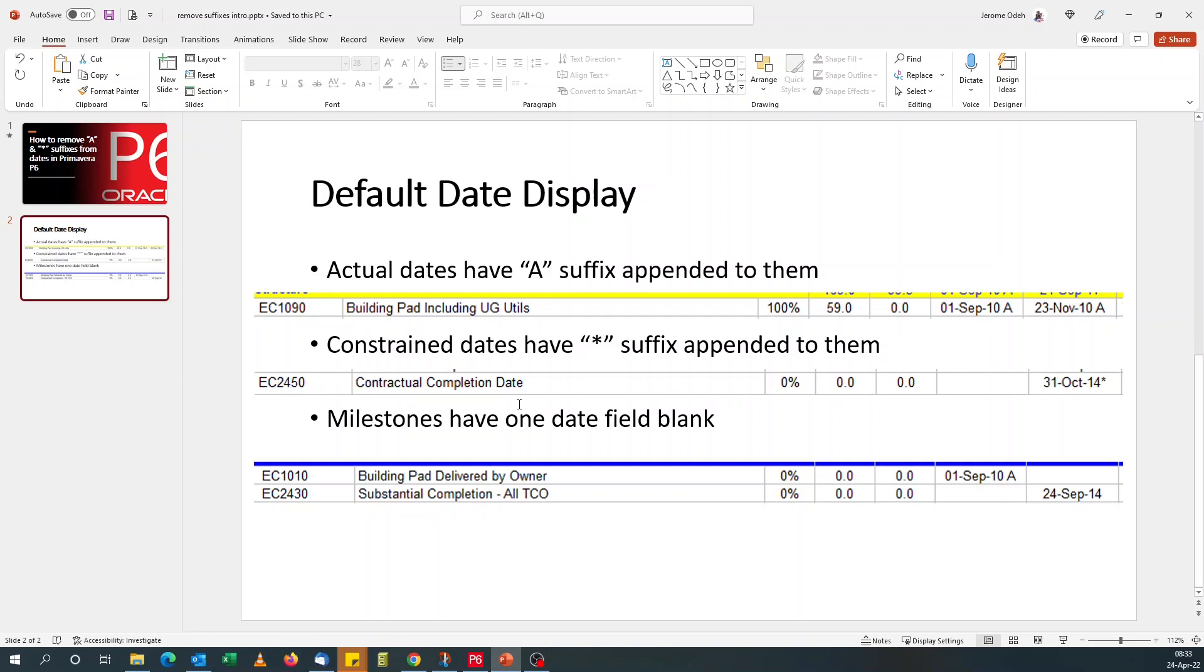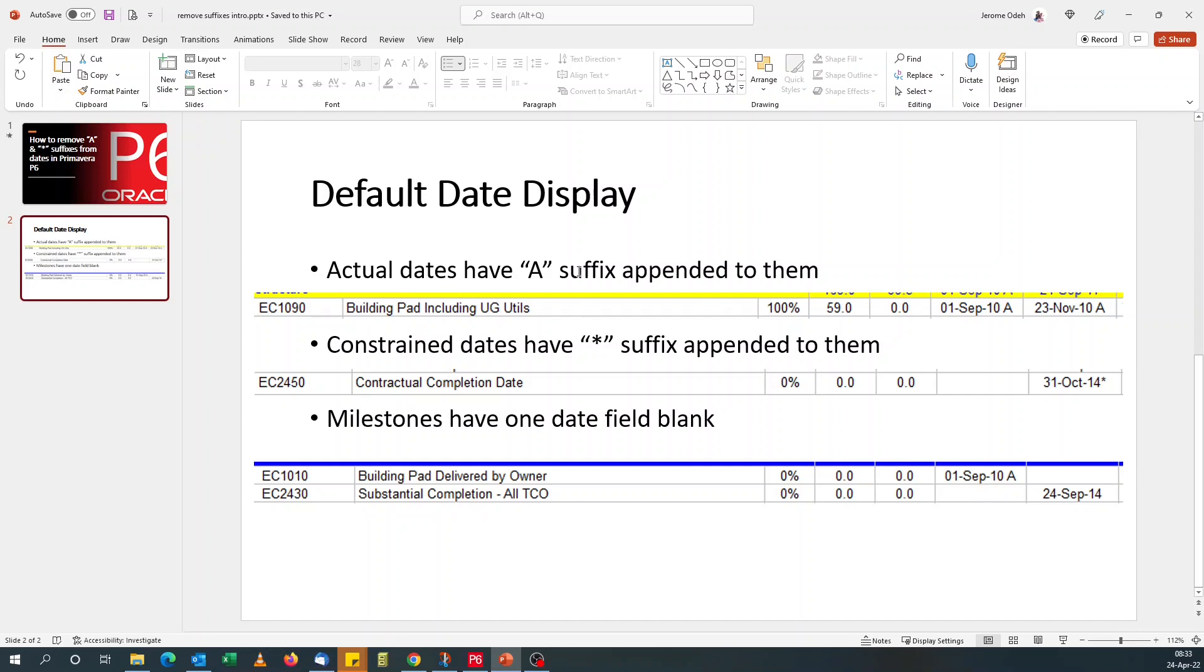And also for those coming from Microsoft Project, you'll be surprised that in Primavera P6, we've got two types of milestones. For start milestones, the finished date is not displayed. And for finished milestones, the start dates are not displayed. So these are the three defaults, the default ways of displaying dates in Primavera P6.